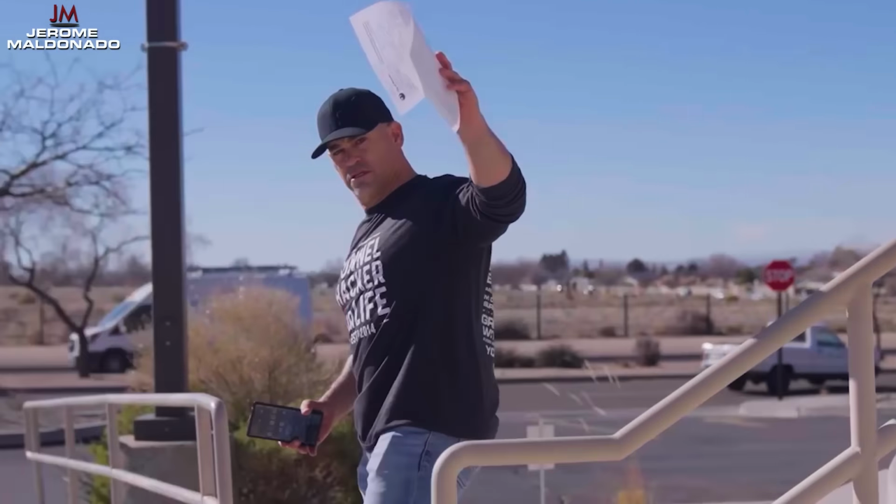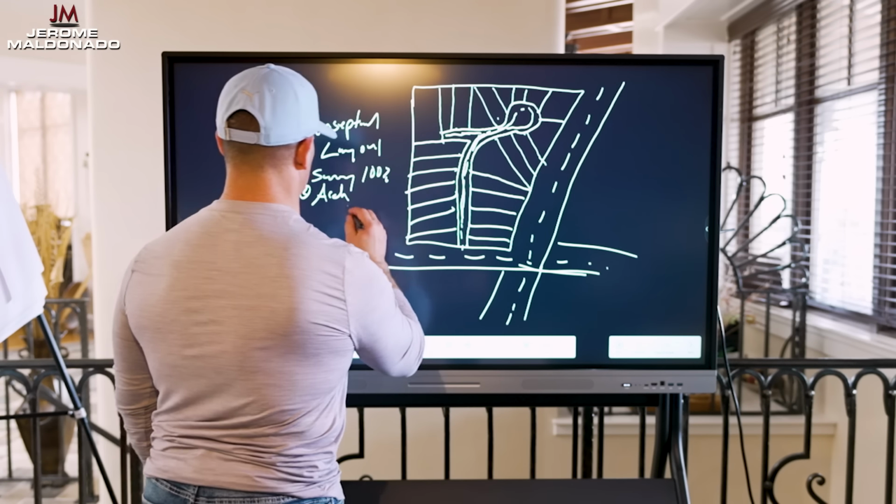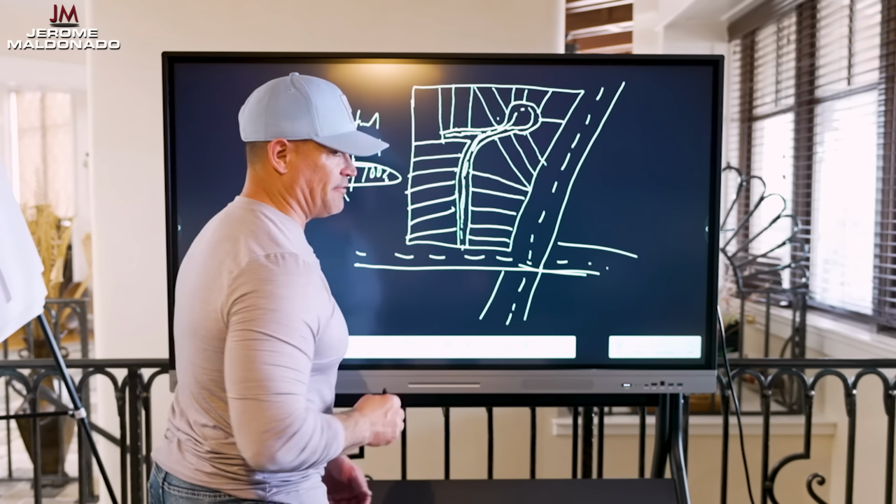All you're going to simply do is go in and simply subdivide land. And so you're going to need a survey company, and the survey company could potentially do 100% of this for you. Some survey companies won't do the entire conceptual layout, so you may have to hire an architect. If the survey company is not sophisticated enough, you may need an architect to help the survey company. Most times than not, something this simple, the survey company can perform 100% of it. When you have a less sophisticated survey company, you may need an architect as well.